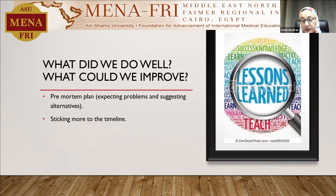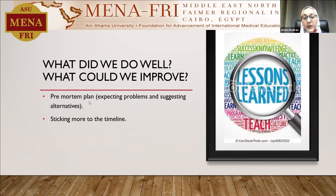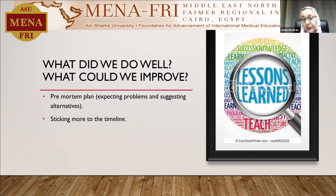In terms of lessons learned — what did we do well? A very important thing that helped us a lot during the project was that we had a pre-mortem plan. From the very beginning we expected problems, anticipated potential obstacles, and started by suggesting alternatives and solutions. This helped us a great deal. The lesson learned here is that planning or developing Plan B, C, and D from the beginning of your project makes a lot of difference.